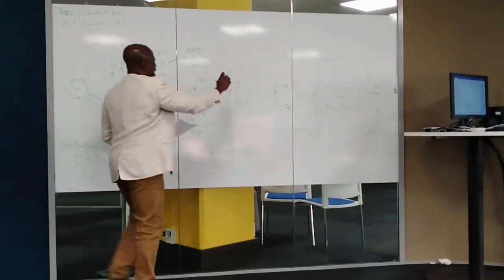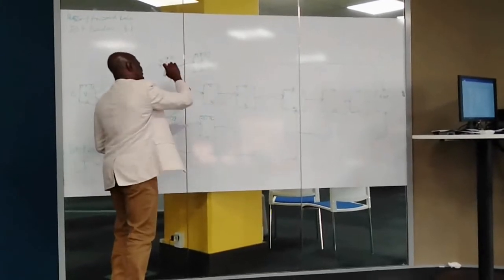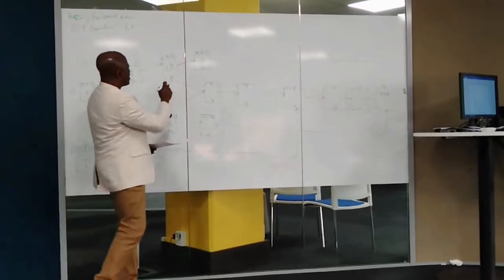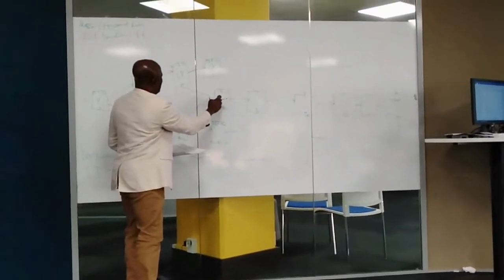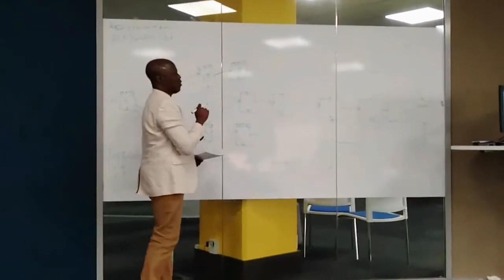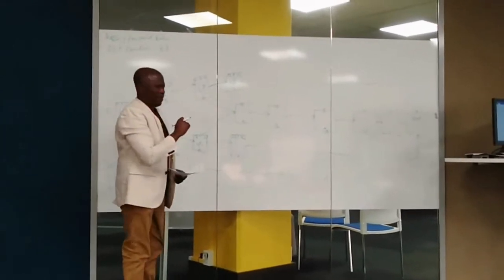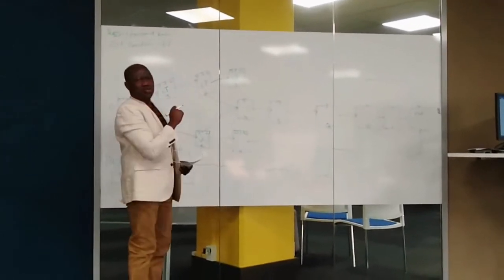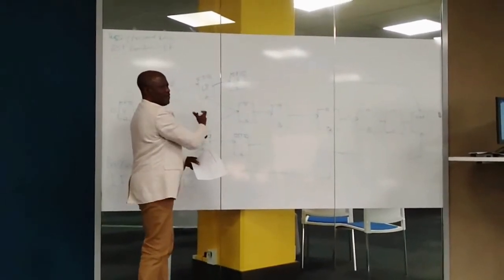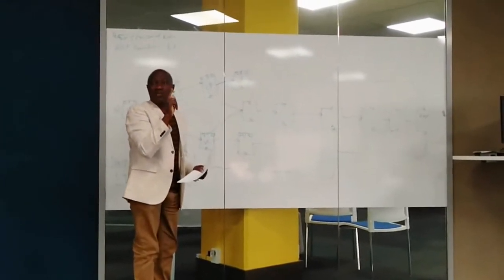Because we are passing forward now, 13. If you have 2 or 3 connections connecting to one activity, we take the highest number of days among them. Activity 8 can only be done after activities 3 and 6 are completed. Look at activity 3, it has the highest day of 12. Activity 6 has 22. When we are moving forward, for any activities preceding another activity, the highest number is what we're going to take.